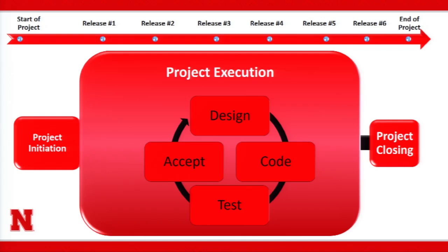Your acceptance criteria might be real specific, saying, using Android, written in Xamarin, I need to be able to log in and be able to pull up a template that has the grand opening option available. If that's met, that acceptance criteria, then I, Kevin, as the product owner, am good to go on that test case. Check.